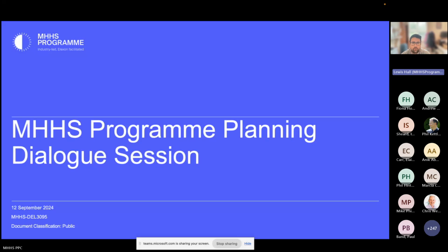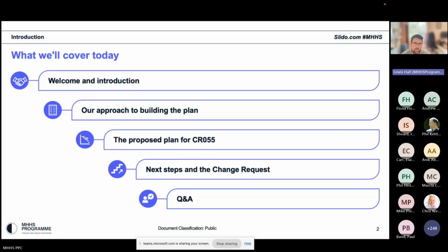Thank you all. What we plan to do today is to go through the proposed plan and the update to the proposed plan as a result of the ongoing scenario planning that we've been undertaking. To remind, this is off the back of some slower than expected SIT testing progress, and we've been looking at what that means for the timeline for the last few months. This is really the proposed output of that exercise that will form the basis of the change request that we'll be issuing out to you for impact assessment in about a week and a half's time.